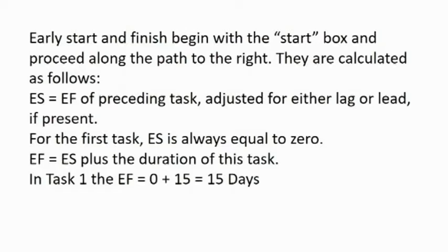From our diagram above, we see that in task 1, the earliest start is equal to 0 and the earliest finish is 15. Therefore, 0 plus 15 gives us 15 days.